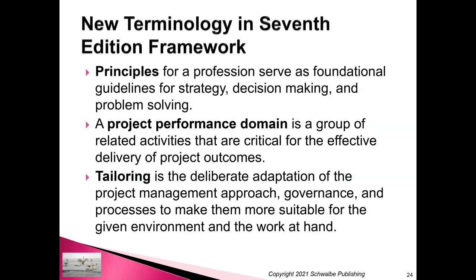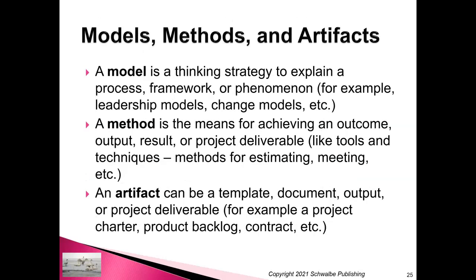Because you will make adjustments or changes to your project, you will have to tailor scope, schedule, or cost, right? If you change any one of them, the other two are going to change. So you have to tailor your project and make trade-offs as you learn new information.